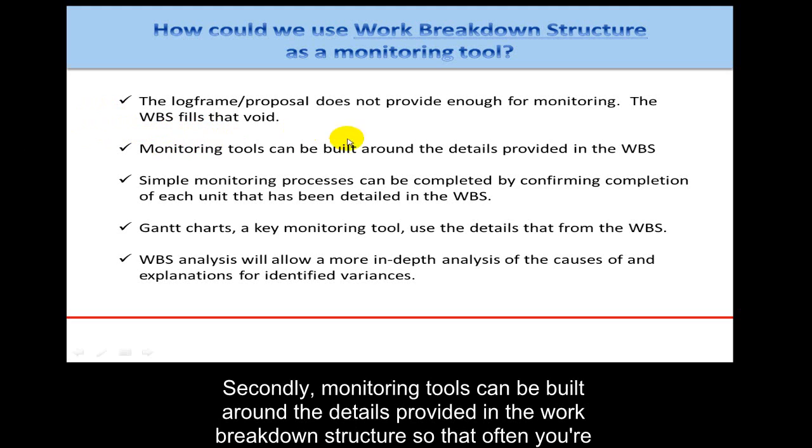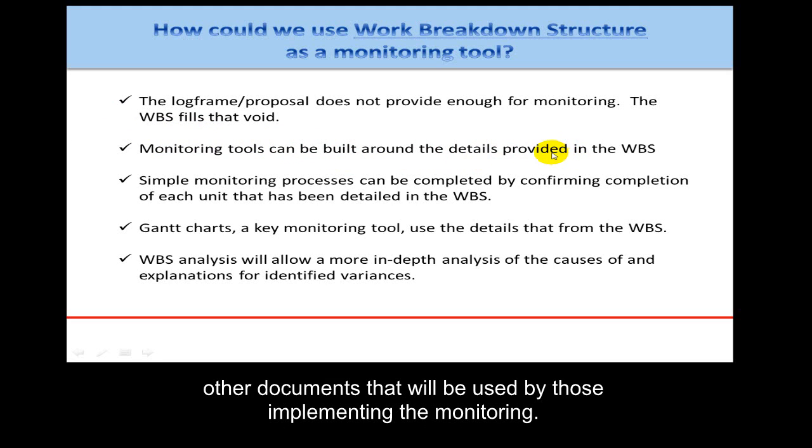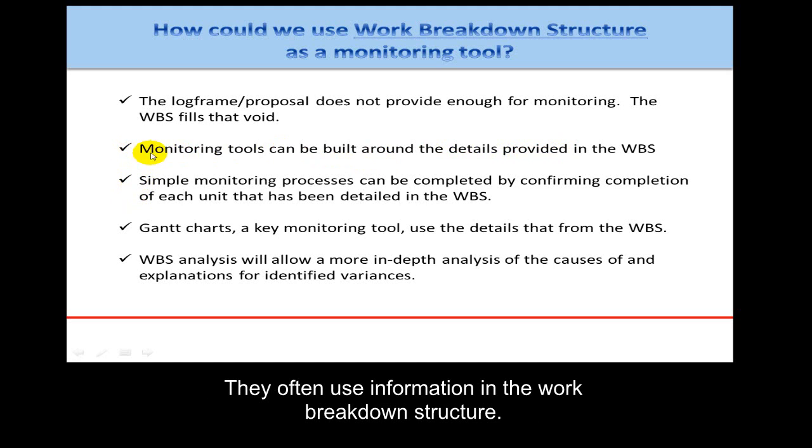Secondly, monitoring tools can be built around the details provided in the work breakdown structure, so that often you're preparing checklists or other documents that will be used by those implementing to provide the monitoring, and they often use the very information that's in the work breakdown structure.